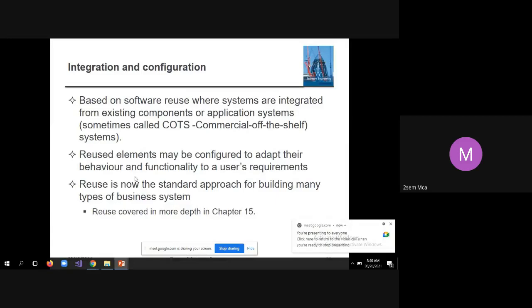What kind of model is it? Is it a plan-based model or an agile model? It's a plan-based model. You have to plan all the requirements to be implemented at once, and the plan remains almost fixed. Then you start all the processes one after the other in sequence and finish the project. That's the waterfall model. Before finishing one process, you are not supposed to start the next process. So that's the drawback of the waterfall model.